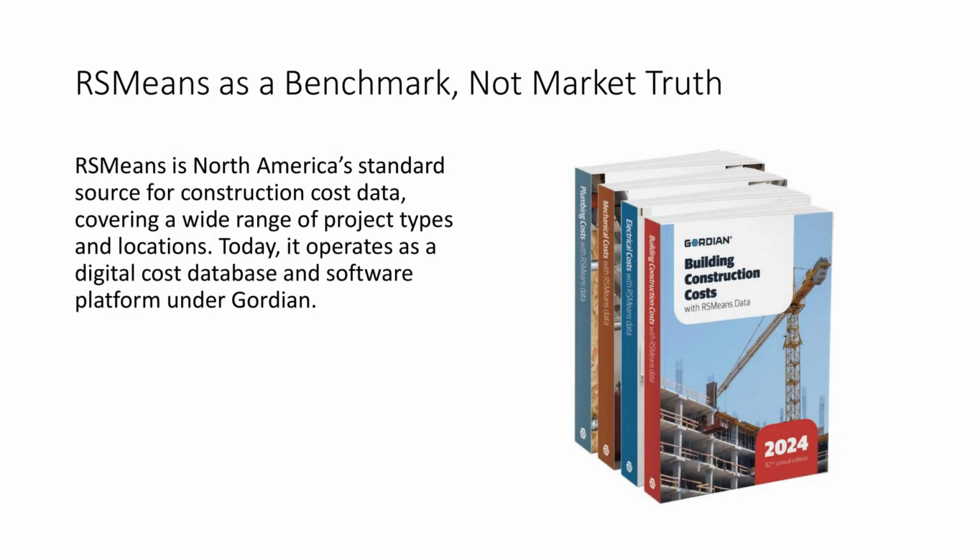RSMeans is best understood as a benchmark, not market truth. It's based on normalized national average data. That makes it incredibly useful for early planning, but risky if treated as local pricing. Used correctly, RSMeans supports decision-making. Used blindly, it misleads.